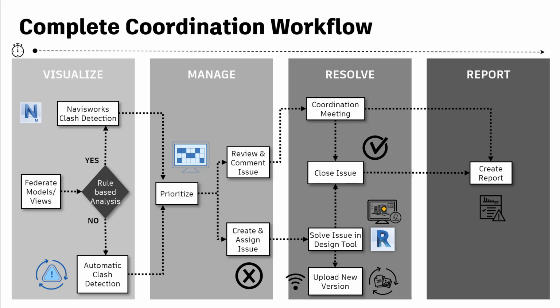All the project members with access can leverage clash status and issue management capabilities to resolve conflicts quickly and efficiently in the design tool like Revit or Plant 3D. As next step, design managers or design project leaders can publish a new version of the project and share it in addition with other trades for a more formal coordination analysis led by the BIM coordinator.